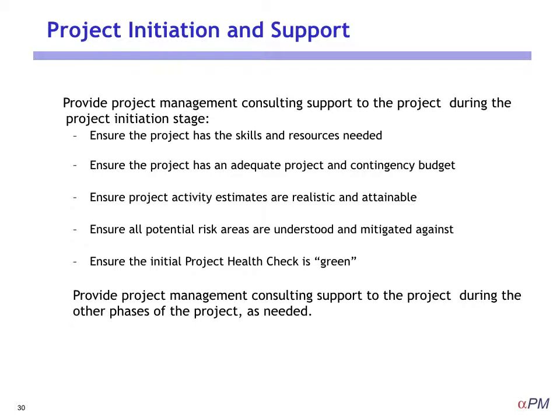And again, I think the concern might be that, hey, how can we possibly provide that with a part-time resource? How can we possibly help other projects? Well, my answer to that would be twofold. One is, first of all, we're assuming that you've got a senior resource that is being made available to help other projects. And number two, very often you will find by just getting, let's say there are 5 projects and they're all having trouble, get them all together in a room for an hour, let the senior project managers helping them listen to what their problems are. I guarantee you half of the problems will all be the same. They'll either be to do with resourcing or to do with some particular process, and you can then sort those out collectively as opposed to one by one.